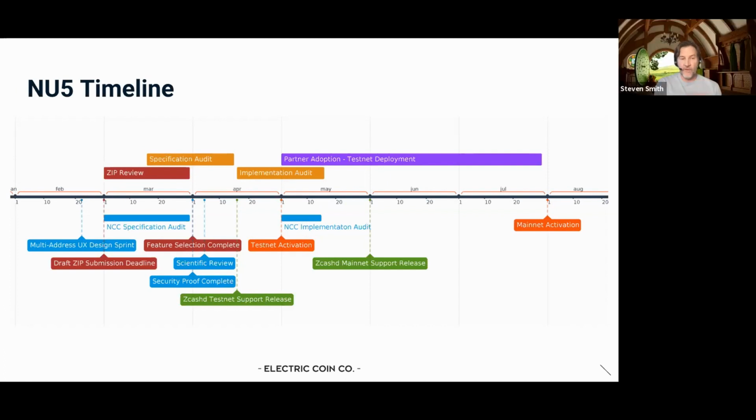Well, the audits and things of that nature, like we've always done, we have to be able to successfully remediate anything that's found in the audits before anyone's comfortable moving forward with an activation. We structured the audit so we get a midpoint feedback set. So if there is anything found, we can get a jump start on working on it prior to the conclusion of the audit, and the two pieces usually run a couple of weeks each because they get focused on it. But yes, we have to have successful remediation of anything found in any of the audits prior to mainnet activation.